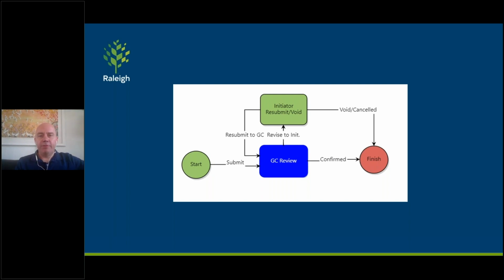And then at the end of the month, each of these daily reports is pulling from the commitment, and it's done automatically. All the calculations are automatic, and at the end of the month we can cut the check to the vendor. But we do that out of our PeopleSoft system, and there's somewhat of a manual handoff at that point, but we're talking about possibly integrating that in the future.